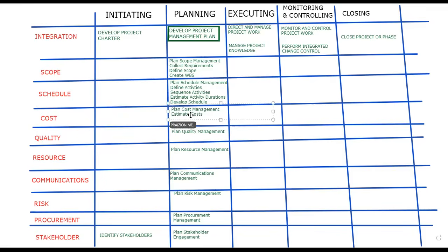Well, of course, you need to estimate the cost for each room. How much will it cost to paint a room? How much will it cost to decorate a room? How much will it cost to lay tile? These are all tasks, but you've got to estimate each of those things. And then you roll them up into a final total. We call that determine budget. See that?